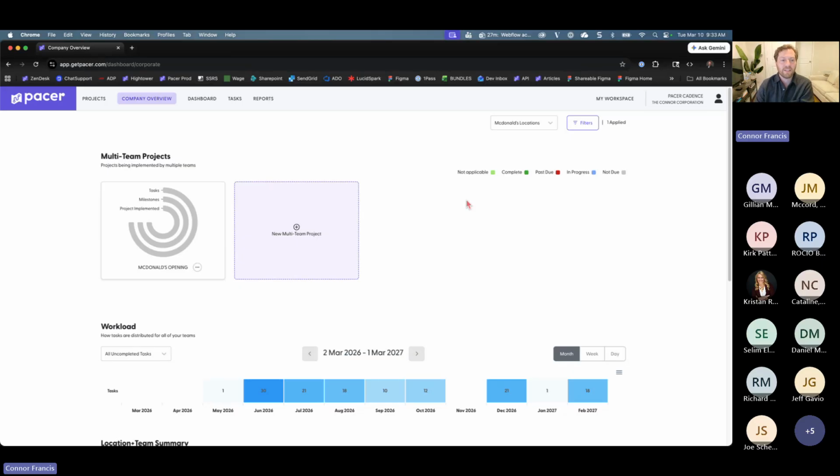You don't have to send tasks to locations that don't need them if you put them on a separate baseline. So that I-95 rest stop in Wilmington, Delaware won't even receive those play place tasks, because they exist in a different baseline that I didn't select. So they actually won't be having to mark all these tasks as not applicable.